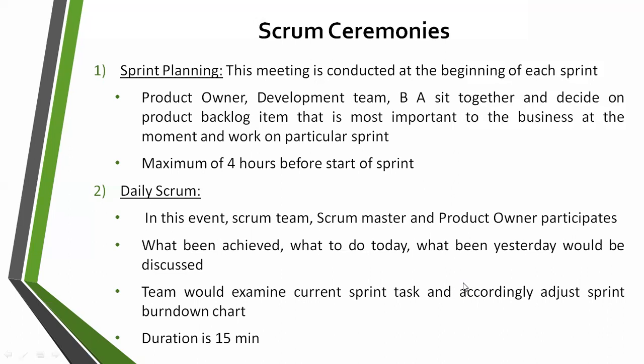In order to discuss that, we are going to have a daily scrum meeting. The duration is generally 15 minutes. Each and every one in the team discusses three things in an open forum: what has been achieved, what we did yesterday, and what work is to be done today.